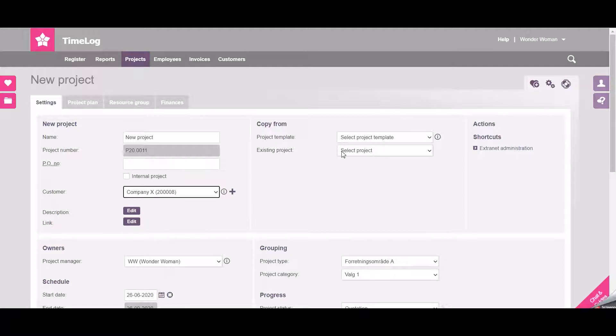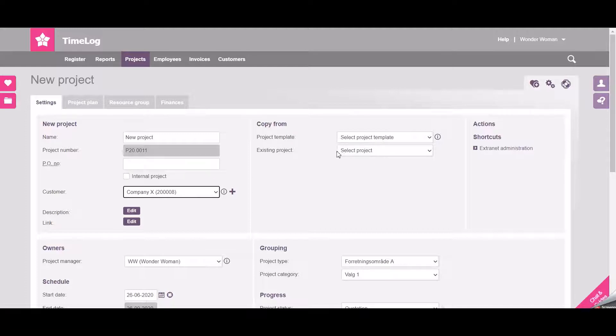This will copy all the project settings, the tasks, and allocations directly to the new project.